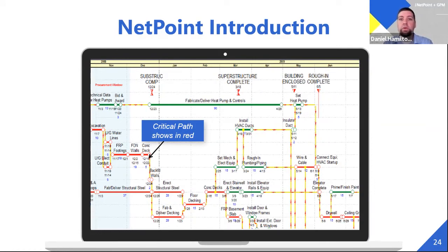This tool is also a direct import for us to Primavera so that we can reduce our time of issuing a first draft project schedule to the project team. The schedule can be printed basically immediately after an interactive planning session. So there's no manual input into P6, wait 2-3 weeks to actually see the schedule. We can basically print this out.